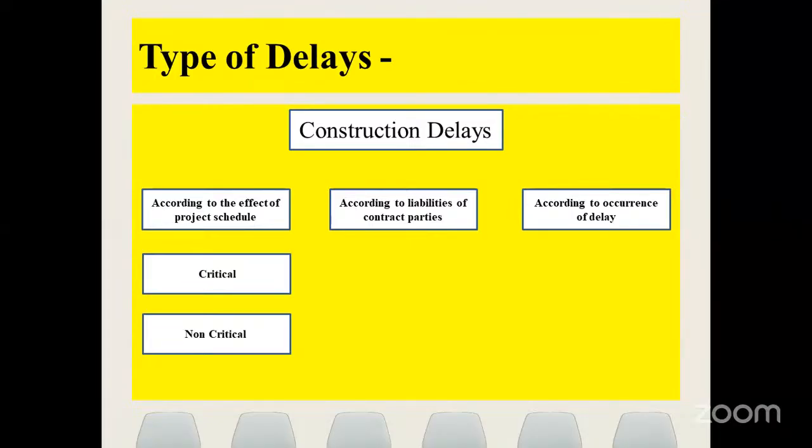Okay, so critical activities play a very important role, and their sequencing and their dependencies with each other will play a very important role. Secondly, non-critical. Why non-critical? Let's say we discussed many times float path analysis. In float path analysis, we find out the near-critical activities, meaning activities having total float greater than 0, but very limited float like 5 days, 10 days, 7 days.